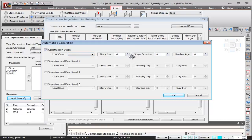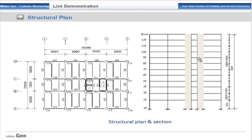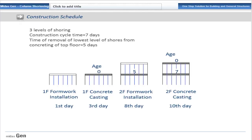We provide information about the construction sequence: the story increment (how many stories are constructed in one stage), the stage duration, and the member age. This is the construction schedule to be followed. There are three levels of shoring, hence the stage cycle reduces to seven days. The time of removal of the lowest level of shores from concreting of the top floor is five days. On the first day, formwork is installed; after three days, concrete casting is done, meaning the member age is zero at casting.